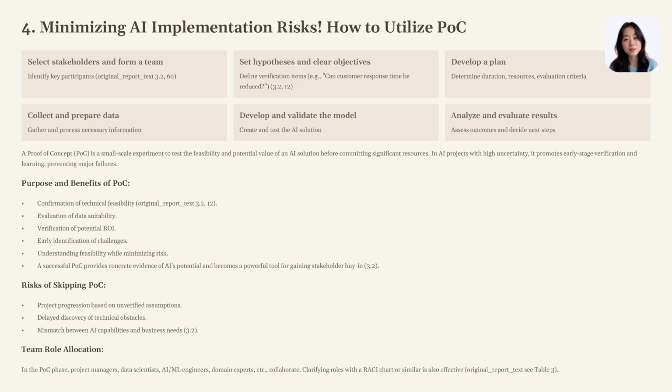This allows you to determine the feasibility of the project while minimizing the risk of major failure. And if the POC is successful, it will be concrete evidence of the potential of AI, and it will also be a powerful weapon to obtain further support and budgets from stakeholders. The way to proceed with a POC is to first select the stakeholders and form a team.